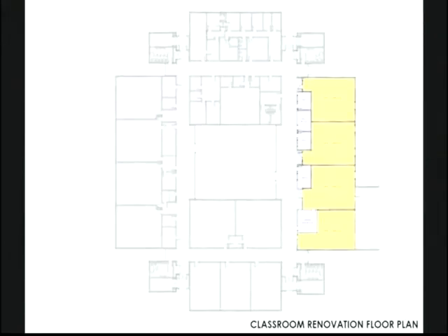Finally, when the media center is completed and the existing media center moves into the new building, then we have the existing media space to renovate, and we are able to create 4 classroom spaces. They are the larger size classrooms, which is one of Laney's needs, the most needed size of classroom. So we'll be doing that. That will happen late in the job after the media center can be relocated. So between those 4 and then the 2 that are going in the gym, that's 6 additional classrooms for the school. That's correct.